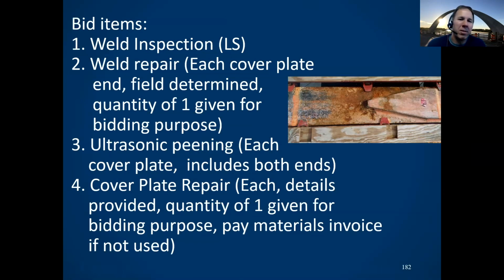But they also might have these cover plates. So we're looking down on a deck that has been removed and formed for a new deck, yet you've got these plates that were welded to the top of the beam or girder. Whenever these cover plates terminate, they become a source of a fatigue crack. They're known locations of cracks. We can't see it before we remove the deck, so we never know whether there's a crack there or not. So we do a lot of things to prepare for that, and you'll have placeholder quantities in your plan.